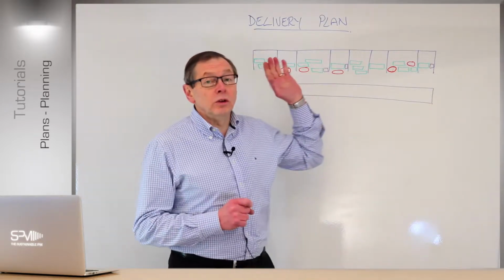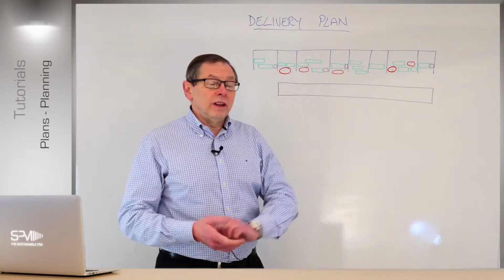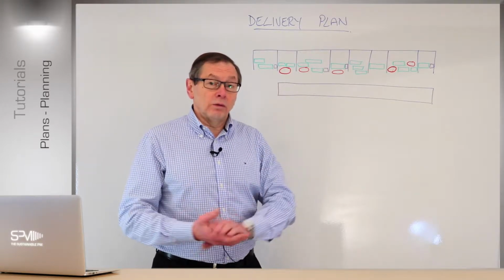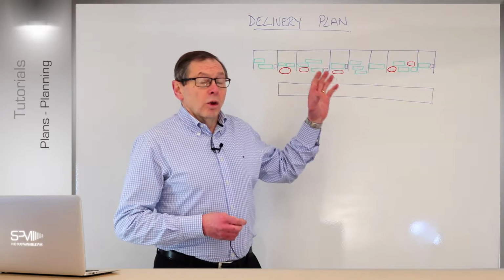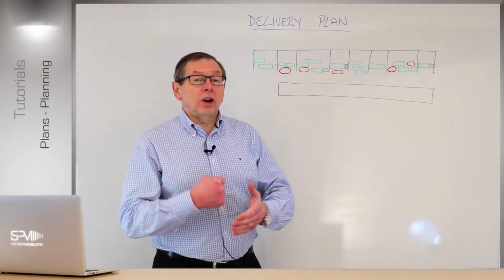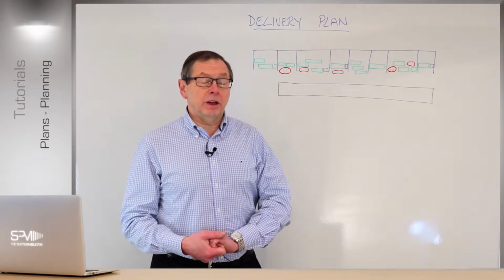Remember, the key thing to remember first of all is when we put the delivery plan together, which is what we do in the design phase, when we are putting a lot more detail behind the project, ready to plan, one of the main things we do at the end of that phase is lock in, baseline the delivery plan, like all the other documents we put together in that phase.